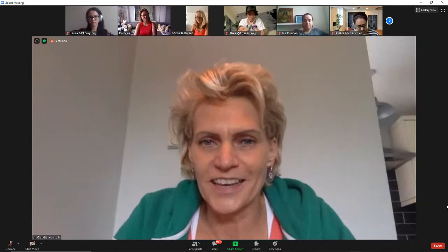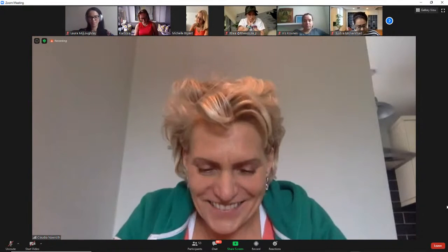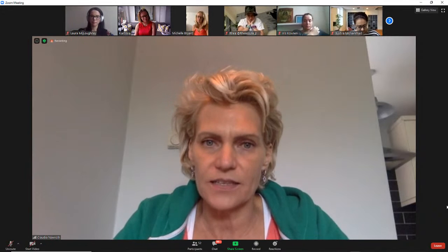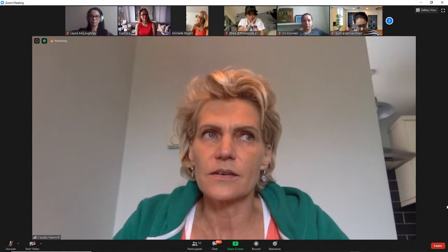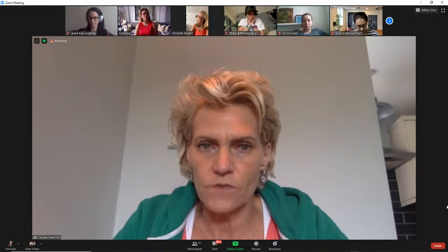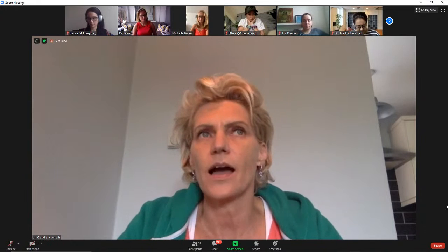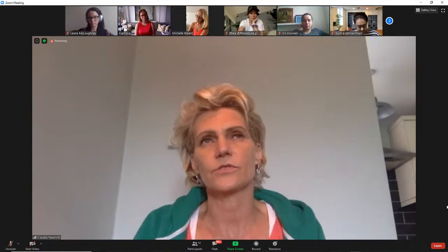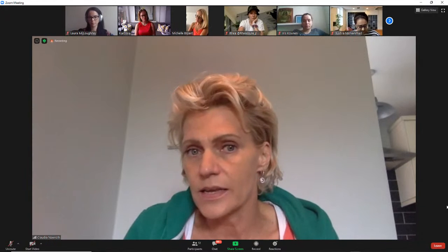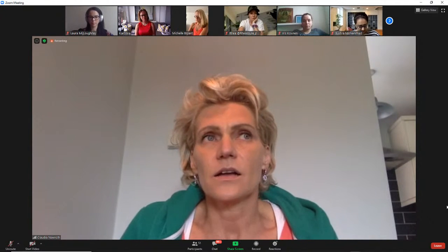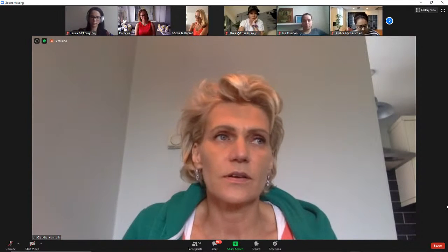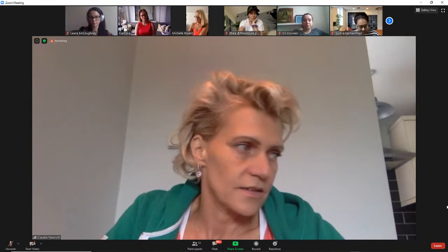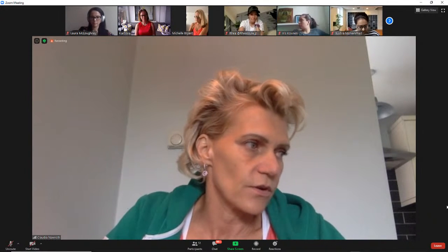Yeah, I get that question a lot. I don't know how other people do it, but I look at the project in its complexity, and also I look at the risks. If there's a lot of risks involved, then I know already that I will have to do a lot of risk management, a lot of communication, a lot of changes will occur, which means I have to spend more time, and time is money. So I will quote differently on a high risk project than I would on a standard easy peasy refurb or something like that. So I can't say really. I don't have a one fit all fee structure.